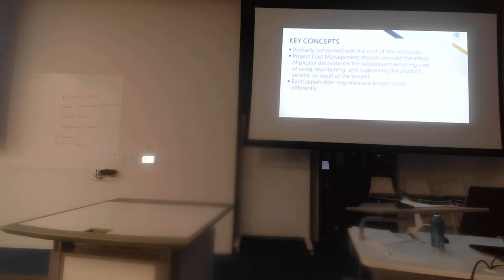So project cost management should consider the effect of project decisions on the recurring or subsequent recurring cost of using, maintaining, and then supporting whatever it is that you're actually working on as a project, whether it's a service or product. So for example, a limited number of design reviews can reduce the cost of the project, but at the same time could increase the resulting product's operating costs. So different stakeholders measure project costs in different ways, and you as a project manager need to understand the level of these stakeholders and their expectations.